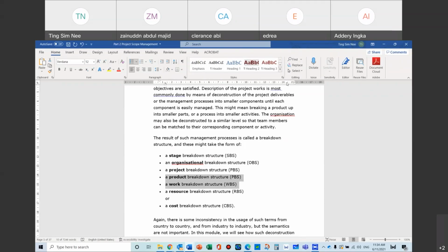You probably go and take logs. You probably go and drill some holes. You're probably going to test some piles. You look at the soil condition, you look at the topography. Those are all the things that are targeted to be collected at the preliminary stage. And from the preliminary stage, the topography, the geographical location, the soil strata, all of this will be part of the studies.